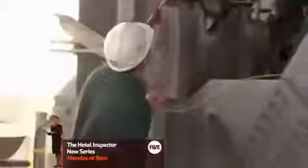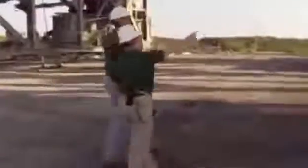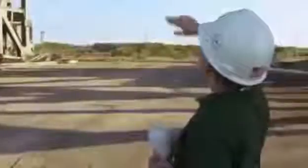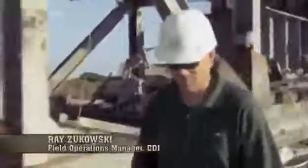Ray, Stacy, and Kevin spread out across the tower doing last-minute checks. Each detonation cord connection and explosive placement must be inspected. Straight away, Stacy finds a mistake. One of the explosives is not connected to the implosion sequence. You can actually see it from here. The problem is fixed, and the rest of the explosives triple-checked. Walk it again for the 50th time.